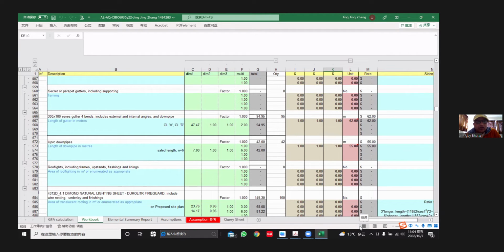So when you see the details for the gutters, it will include the material which is being used to construct the gutter, and stop ends and everything would be part of that. So don't worry about that, because that is the comparative rate you're going for. But your rainwater heads are a separate unit which are installed in the gutter. Those ones should be measured as well. It's clear, because in your developed drawing, you would have that much information.